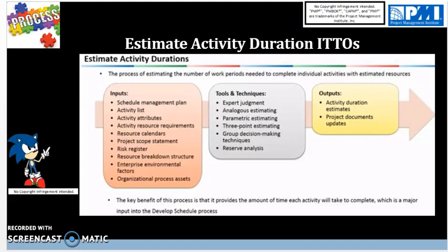So the overall project budget is usually the cost baseline plus management reserves. Remember, the cost baseline includes the contingency reserves as well as the estimates from all the work packages. So I'm reiterating that point: whenever you hear the word budget, don't just take it as a cost baseline. It includes the cost baseline plus your management reserves.